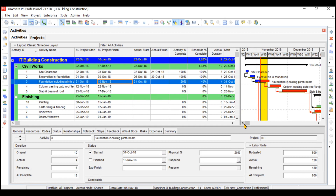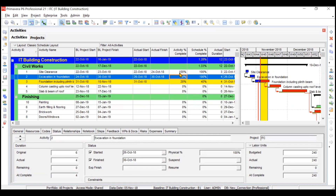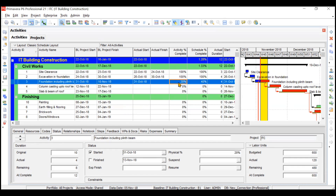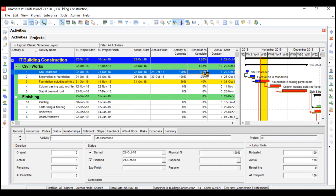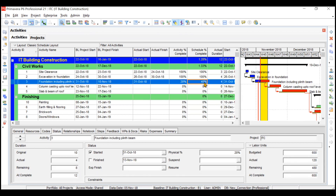In the earned value video we'll be seeing parameters like Estimated Completion, Schedule Variance, and more. One more thing: Activity Percentage Complete shows 100% for the first two completed activities, but only 20% for the third. Schedule Percentage Complete, based on the data date of 5th November, shows this activity should have been 40% complete — because from 31st October to 5th November is 40% of the total planned duration. This is the significance of Schedule Percentage Complete.